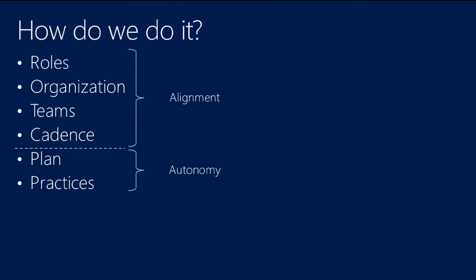But where we give autonomy, and cadence is the same. You heard me talk about this already, 3-week sprints. Everybody, 3-week sprints, that's it. A lot of people ask me, well, what if every team wants their own sprint cadence? And I go, good luck with that. I think it's crazy. I don't think you can make it work. If you've got every team on their own set of sprints on a different schedule and you want the tools to support it and make sense of it, I just kind of cringe and I go, I can't help you solve that problem. So I think you need to get all on the same sprints.